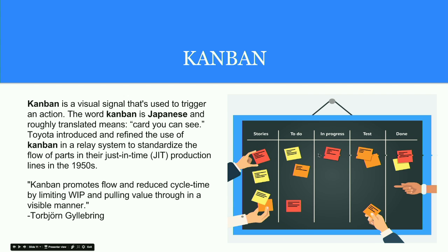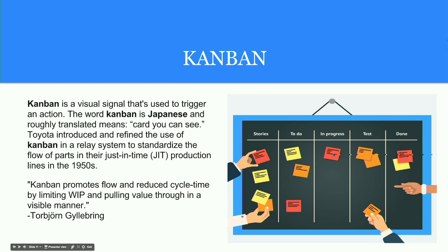The most important part of Kanban is this board — it's pretty simple to work upon. We can simply manage our tasks here: we can put our stories, to-dos, and in-progress items. An important part is that we can limit work-in-progress items. For 'in progress,' we can limit to maybe three or four items at a time.